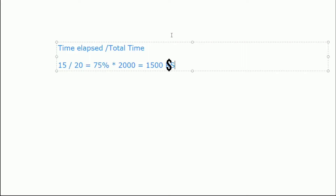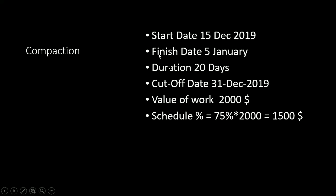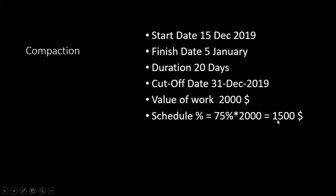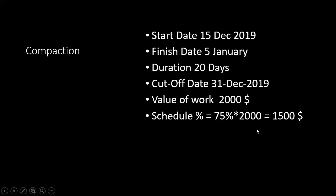The result of 1500 is expressed in monetary terms. You can also calculate using weightages — the percentage then multiplies to the total cost and gives you the cost equivalent. Primavera 6 converts costs and man-hours into percentages using this same methodology. The beautiful dashboards in Primavera 6 are built on this logic, and that is how Planned Value is calculated.